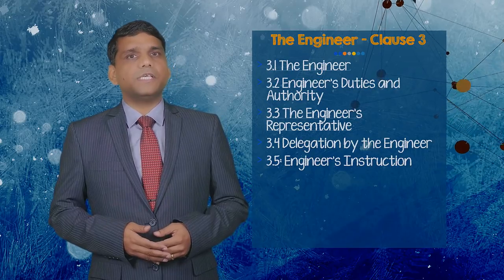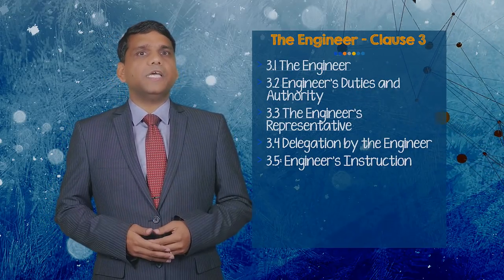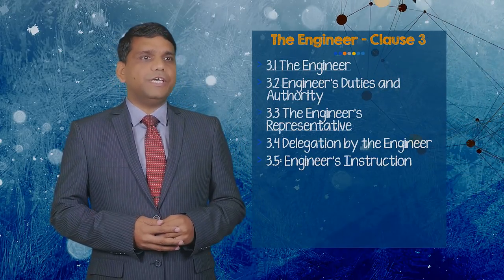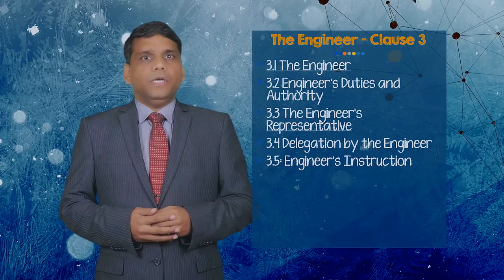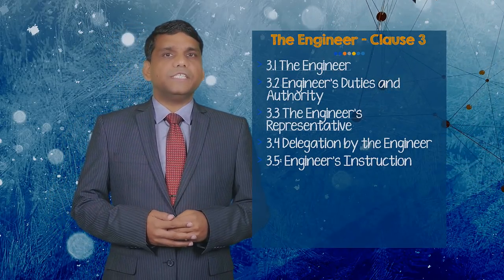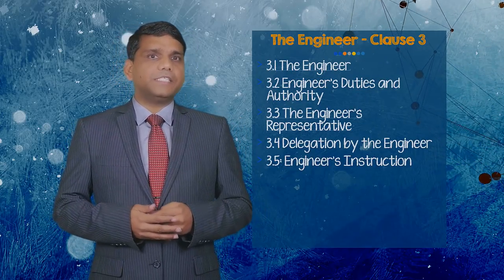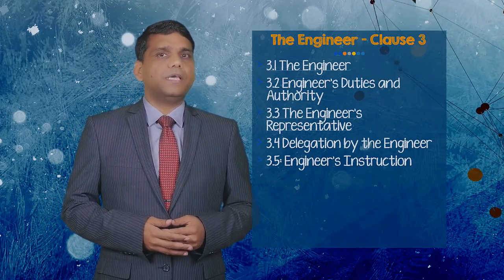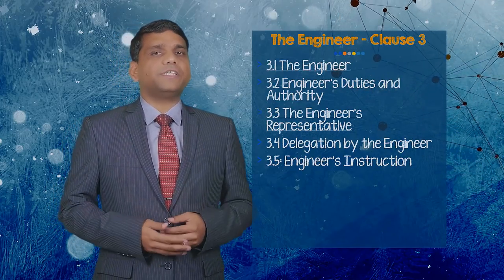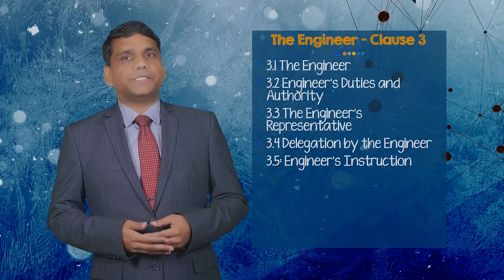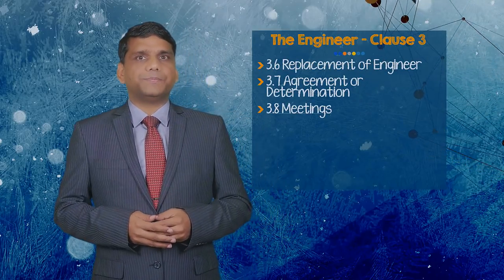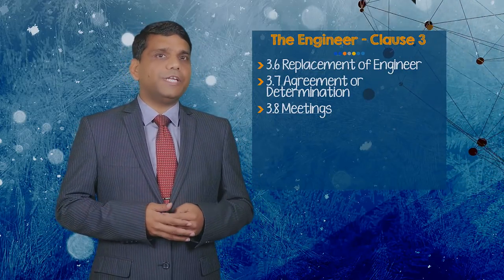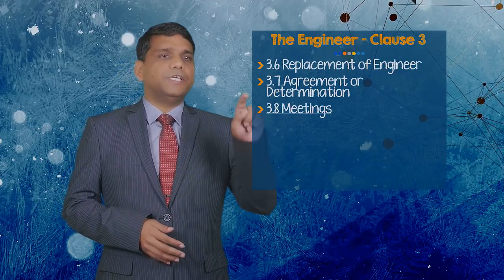The number of sub-clauses increased from 5 to 8. These additional clauses include sub-clause 3.1, the engineer, and sub-clause 3.3, the engineer's representative. Sub-clause 3.5, engineer's instructions, requires that if the contractor believes that an instruction by the engineer is a variation, he has to give notice immediately before its compliance. However, this sub-clause is silent on whether the contractor claims a variation later without a notice.